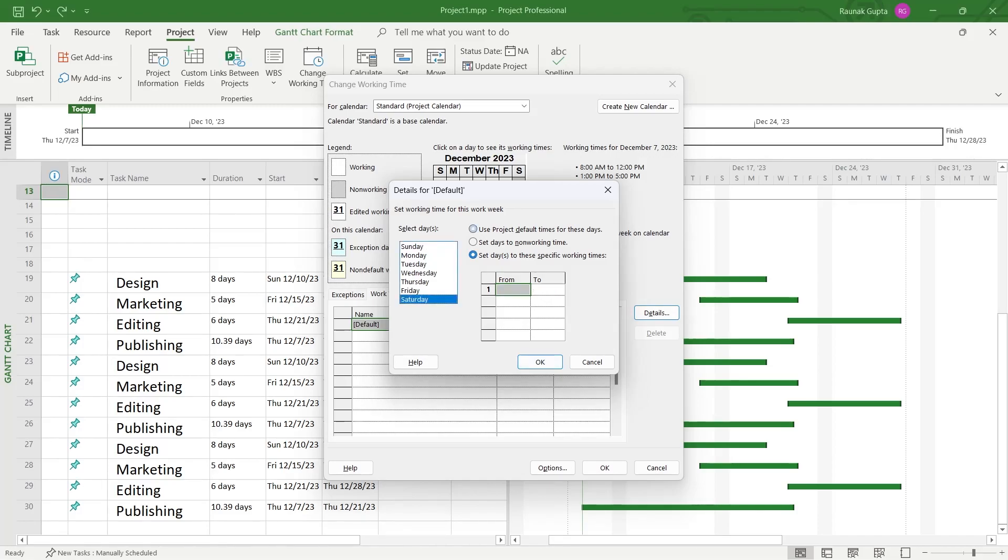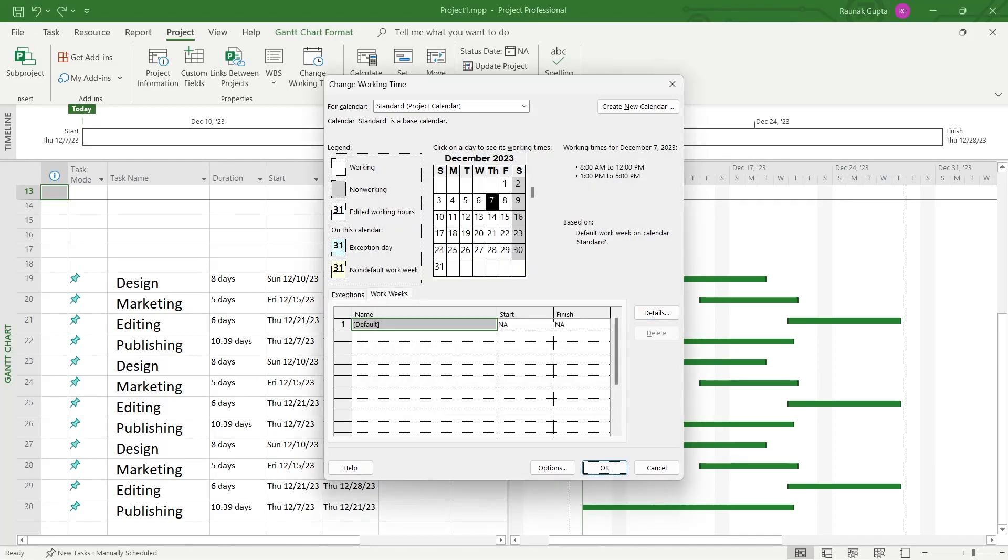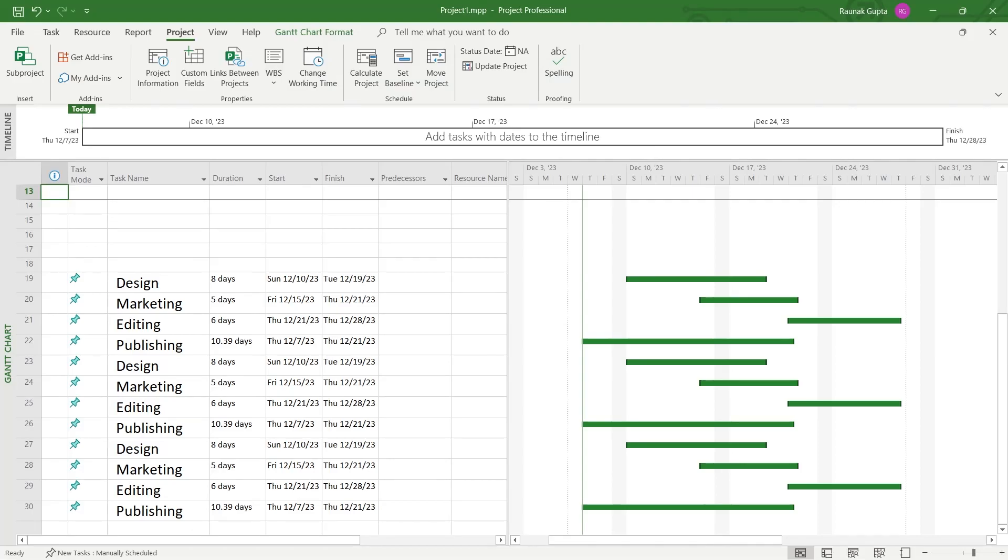You can select any one of these days as a working day but I'm selecting Sunday for example. Click on OK and now what you're going to do is click on OK. After I click on OK, Sunday has been set as a working day.